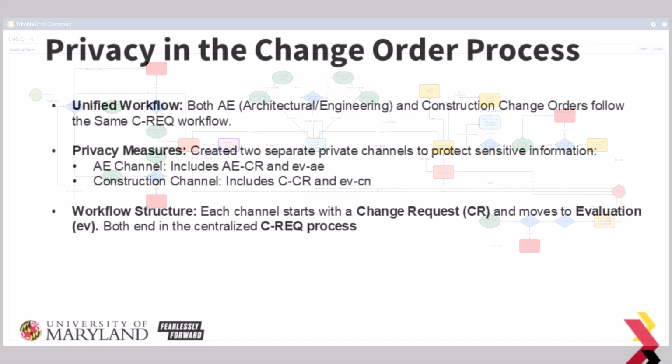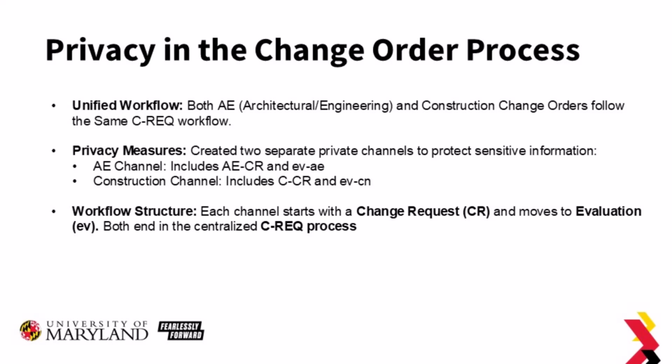Now, let's talk about privacy in the change order process. Since both AE and construction change orders go through the same CREC workflow, we created two separate private channels, one for AE and the other for construction primary contracts, to protect sensitive information and keep workflows distinct.